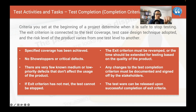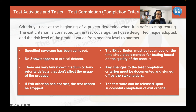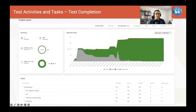Test completion: what is the completion criteria? It's what you set at the beginning of the project - when is the time to stop. The exit criteria is connected to test coverage, test case design techniques adopted, and the risk level of the product, which varies from one test level to another. The criteria include: specified coverage has been achieved, no show-stoppers or critical defects have been logged, very few non-critical or low-priority defects that don't affect product usage, and the business has signed off. If exit criteria has not been met, the criteria must be revamped or testing time extended, and any changes must be documented and signed off by stakeholders.